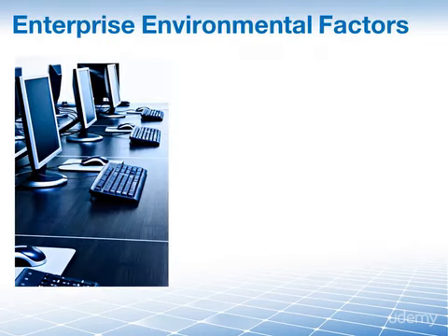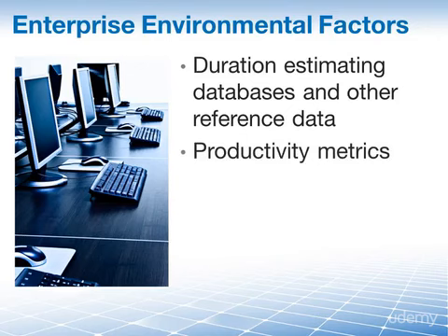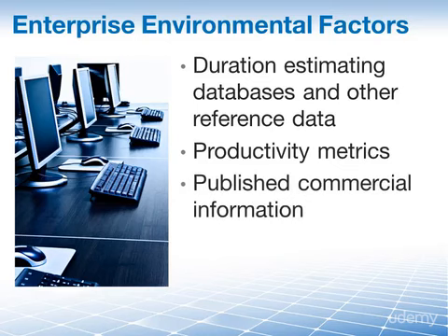One of the reasons why we need enterprise environmental factors is because we want and need the reference data. Although projects are by nature unique, your company will probably have done similar projects in the past, and as such, historical data on estimations may be available internally in duration estimating databases and other reference data sources, or they may be available as productivity metrics, or you can also buy such databases externally, or this is available as published commercial information. These are very helpful in areas where the duration is clear-cut, like it takes 2 hours for paint to dry, or it takes 3 weeks for a license to be approved, or a building inspection takes 8 hours.